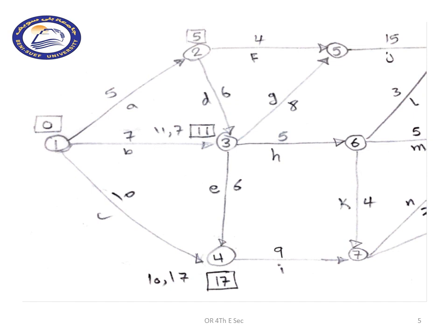Node 3 represents the starting point for each of 3 activities: G, H, and E. If we selected the number 7 as the earliest possible starting time for node 3, this would only allow activity B to be completed and activity A to be completed with 5 weeks, and only 2 weeks of activity D would be completed, leaving 4 weeks of activity D incomplete. This will not meet the condition of having to wait for activities B and D to finish in order for activities G, H, and E to start.